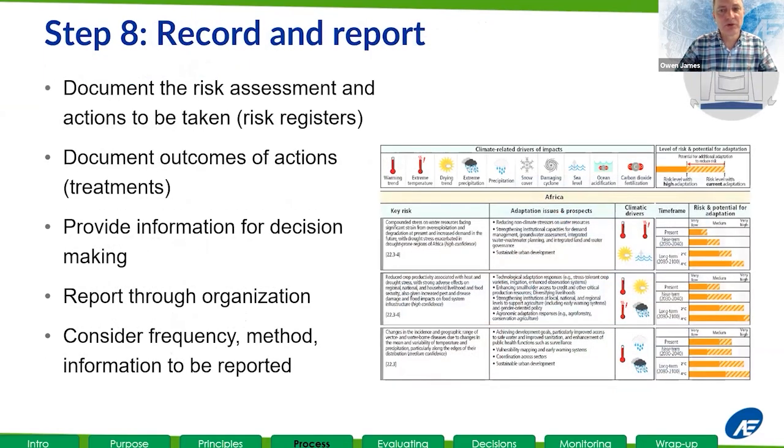Capture and report the risk. Capture and report the risk information that you learn. So this could be on a risk register or some other recording system, or it could be something a little bit more visually appealing. So the information will be dependent on who the audience is. Again, when we think about reporting information, we need to think about who are we communicating that information to.